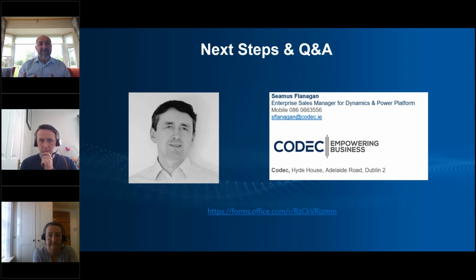The next phase of the project is where we build and configure. There's minimal involvement, but we give you tasks to get involved in, working on data migration, preparing test scripts for testing. So there's always activity, but the biggest areas of activity are the very start, requirements, and the very end, training and testing before go live.